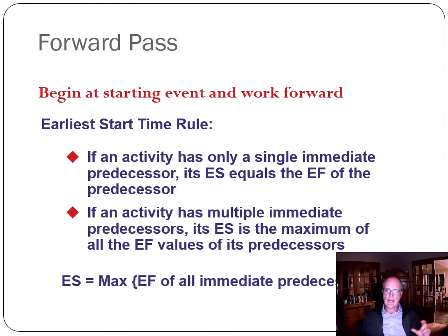And if you have several tasks that have to be finished before the individual task that you're looking at can start, the earliest start time is the largest of those earliest finish times that precede it. The subsequent tasks can't start till it's finished, so you take the biggest earliest finish. And I'll show you that in an example shortly.